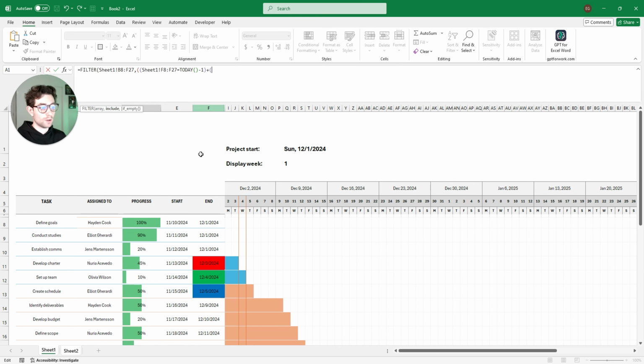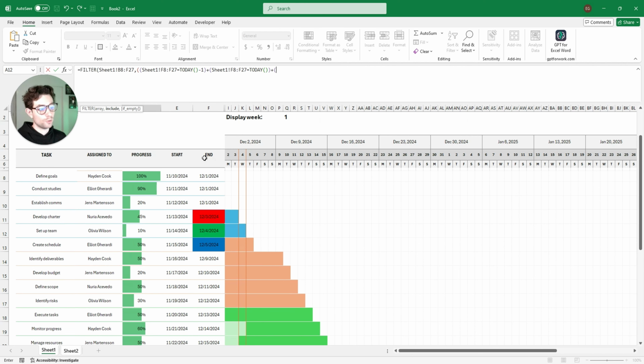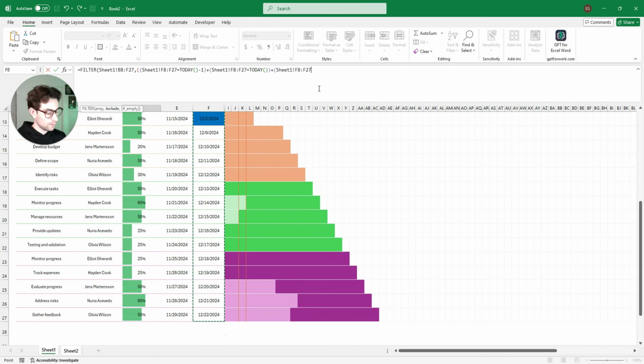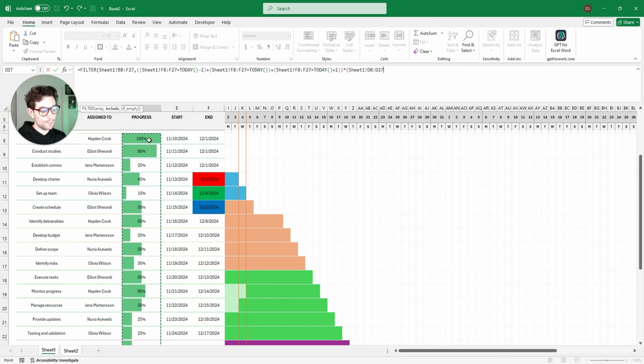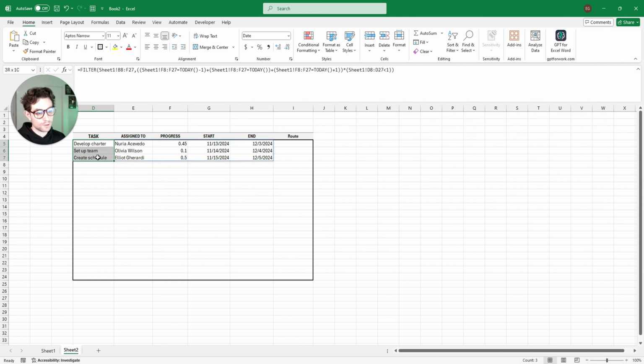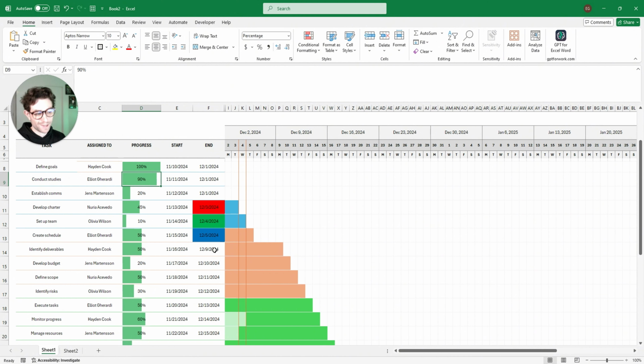So let's continue here, plus add more data equals, this one we'll just make it due today. Close that, and then we'll add another plus, open up a parentheses, and do the last one here, equals today, and then close that, +1, close that, and then now we add the asterisk, open up parentheses, and that's going to be this data here. Grab this data here, and that is going to be less than 1. Close that, and close this parentheses, and click enter. And there we go. Now we have filtered exactly the names that have not completed their project at 100% and that are either past due or getting close to that deadline.